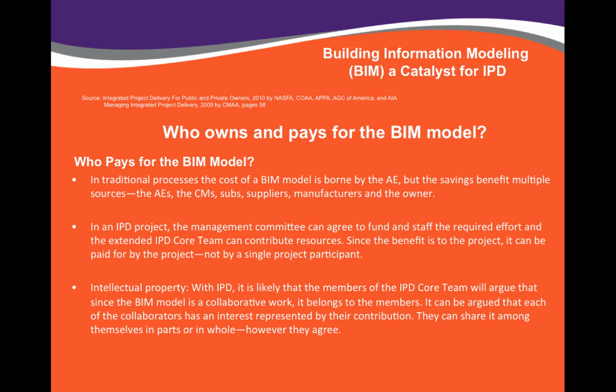In an IPD project, the management committee can agree to fund the staff required effort, and the extended IPD core team can contribute resources. Since the benefit is to the project, it can be paid for by the project and not by a single project participant. With IPD, it is likely that the members of the IPD core team will argue that since the BIM model is a collaborative work, it belongs to the members. It can be argued that each of the collaborators has an interest represented by their contribution. They can share it among themselves, in parts or in whole, however they agree.